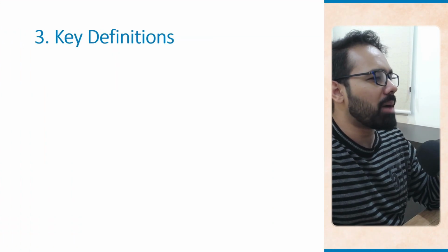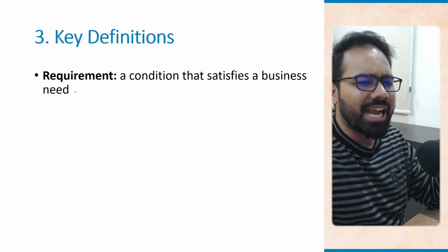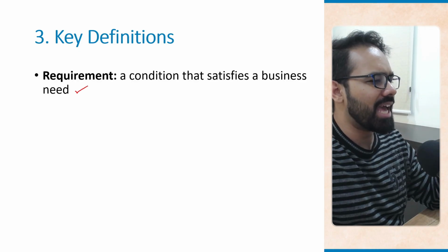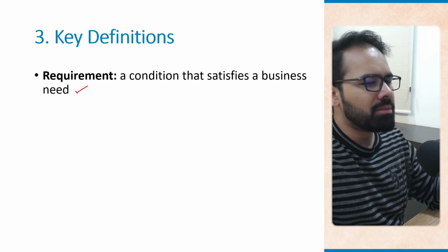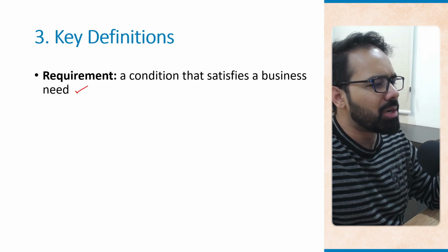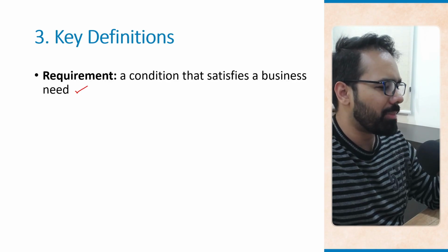All right, let's talk about key definitions. What is a requirement? A condition that satisfies a business need. As simple as that. For our e-commerce website, a requirement could be that customers must be able to pay using credit cards and digital wallets. That could be a requirement, as simple as that.